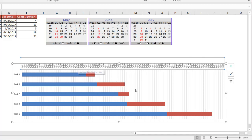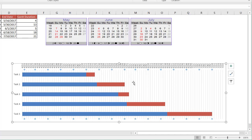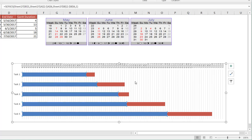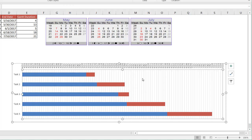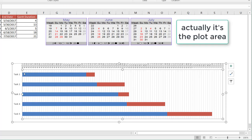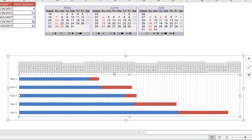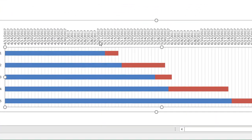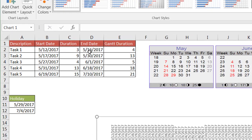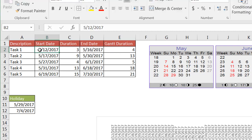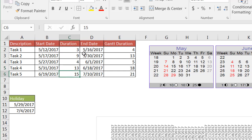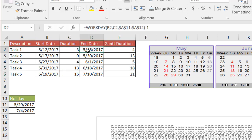Close this. Let's bring in the chart area a little smaller since it's kind of overtaken it. Let me click into the chart area. Now the chart area is selected, move that down a little bit. Now we can see our dates, 5/12 to 5/16. So how do we get the correct duration here, the correct Gantt duration? You can see the first value here is manually inputted, and the second value also is manually inputted. Now to get the end date so we can figure out the Gantt duration, this is going to take a formula called WORKDAY.